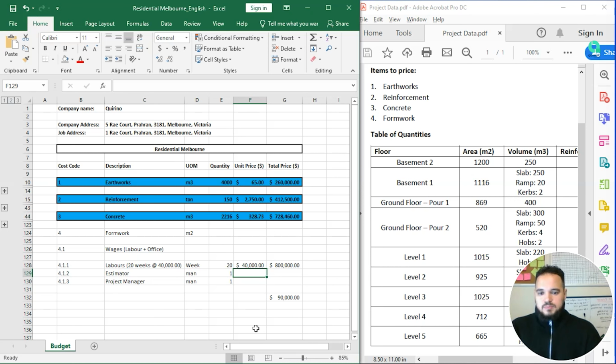90,000 a year. So this project is going to run for 20 weeks, so 4 months. So let's say the monthly salary is going to be 7,500. So it's going to be 7,500 times 4. Then let's allow a little 20% extra, because we will have, you know, extra costs. So 36,000 for 4 months. So this is going to be the product between these two, which is okay.